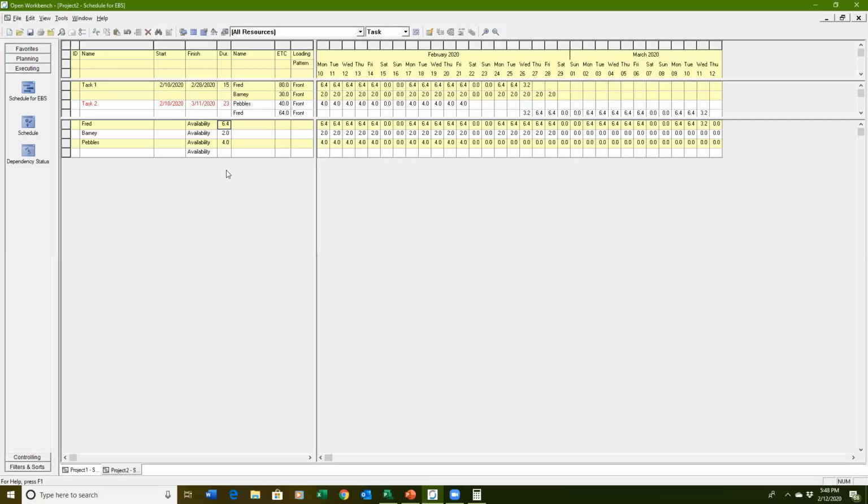My take on that, just briefly, is that if you use 100%, you're not taking into consideration that there might be PTO, there might be team meetings that have nothing to do with executing against the project, town hall meetings, you name it, sickness, whatever, okay? If you plan with 100%, your schedule is going to essentially build in its failure because nobody's available to your project 100%. Very rarely, unless you're working overtime, but that has limitations as well. So that's essentially an effort-based scheduling.